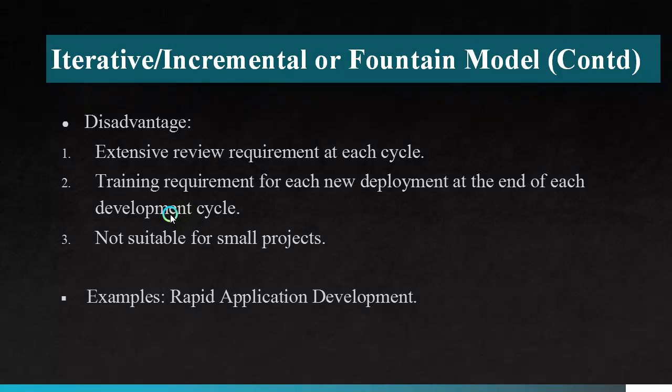Disadvantages: extensive review requirement at each cycle, to ensure that the process flow is going in the right direction and to validate the effort during the phase. Training requirement for each new deployment at the end of each development cycle. As we said, the customer requirements are flexible, so after each development, training is required. It becomes hectic and also complex for the developer. Not suitable for small projects. Examples for this model: rapid application development.